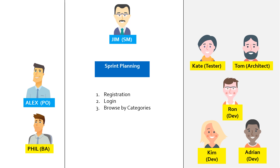You may ask, what is a story point — is it man days or hours? No. One story point is the smallest unit of work taken by the team to complete a task, and it varies from one Scrum team to another. The estimation happens using a planning poker game. As soon as the product owner walks through the stories, each Scrum team member estimates and has the card ready, and once everyone is ready, they reveal their estimated story points and the team discusses and agrees to a common estimate. Once the refined stories are estimated, the team discusses how much they can commit for the two-week sprint. The combined story point total is called velocity and this becomes one of the parameters for next sprint planning.